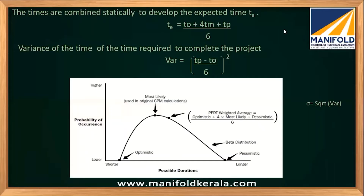When you have these three time estimates, you can calculate the expected time te. The formula is: te = (optimistic time + 4 × most likely time + pessimistic time) / 6. This is a weighted average where more weight is given to the most likely time, which is logical since the chances of the optimistic and pessimistic times occurring are very low.